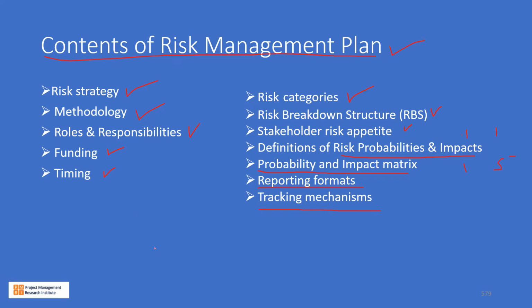So as discussed earlier, whatever consumes time and cost must be scheduled, must be part of the plan, must be part of the work breakdown structure. So risk management will definitely consume time, effort, and cost. So this must be factored into the plans.